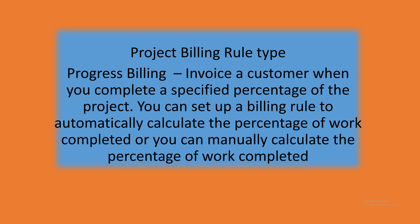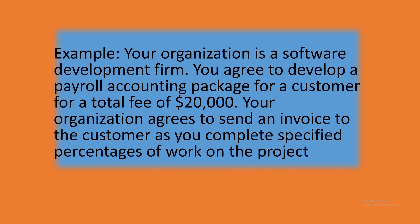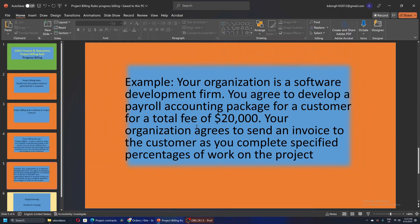Let's take a simple example. Your organization has backed an order for software development. It's agreed with the customer to develop a payroll accounting package for $20,000 US dollars. Your organization agrees to send an invoice to the customer as you complete some percentage of the work. So let's quickly take this scenario in the live system and see how the system behaves.